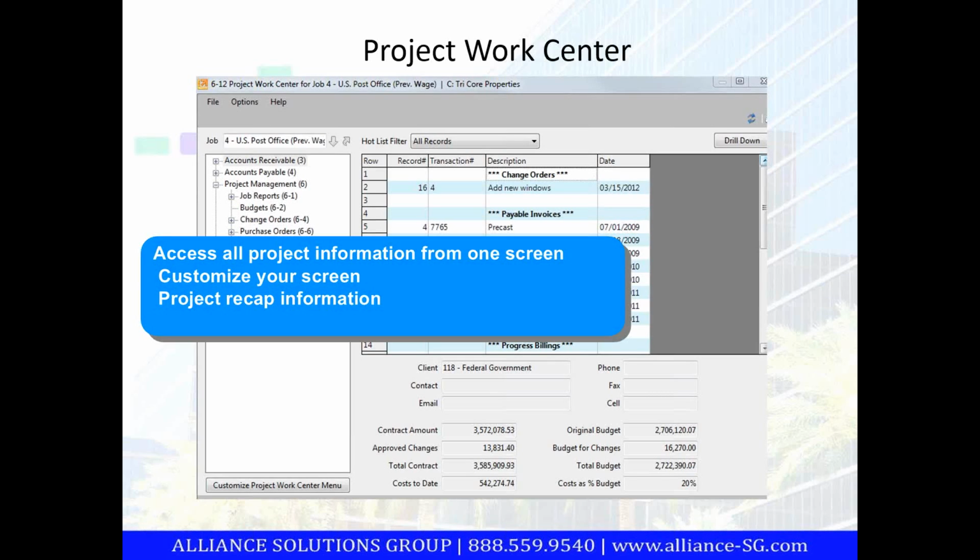Now, all this data that I'm capturing within Sage 100 Contractor is only good if someone's looking at the data. So we have some things within the system where we can automatically email reports to project managers, to CPAs, to owners. We can have it automatically send alerts to project managers when they go over budget on a line item. I can have it automatically tell me which subcontractor's insurance is going to expire this month so I don't forget to follow up on it.